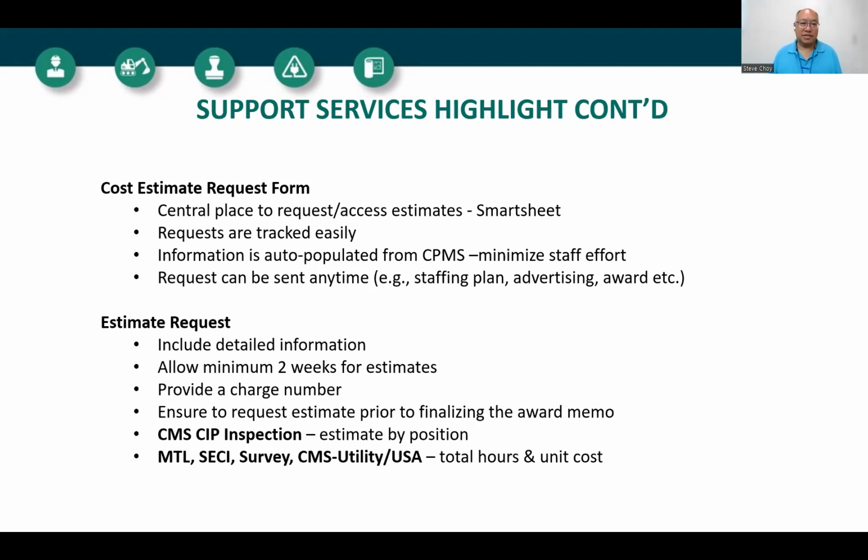The estimate request itself, help us help you. Be detailed if you can. This is going to be an iterative process. We're going to give you an estimate from that 10,000 foot level, just based on what we forecast. So we need to have a little bit of information to do that. If you only want some placeholder numbers, let us know that. This way we won't have to put a lot of work into providing you a detailed estimate. We'll just give you some approximate numbers to put in there.